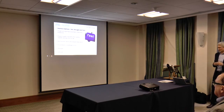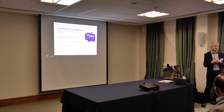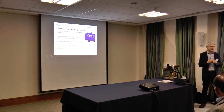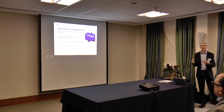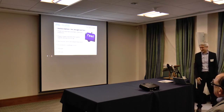One assumption that we made, and I'm a bit embarrassed to stand up and say it, but we did think that one or two pieces of the core functionality would work. We assumed other people had used them. They hadn't. That gave us some challenges fairly late on in the project. So again, one builds in assumptions that you think are reasonable. Sometimes they don't always work out the way you want. And all I can say is, test.